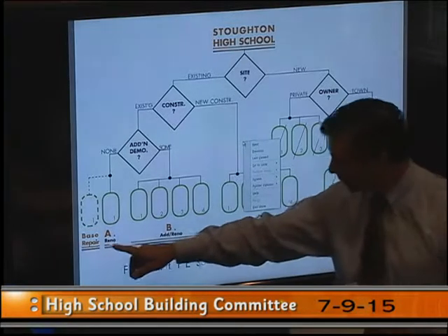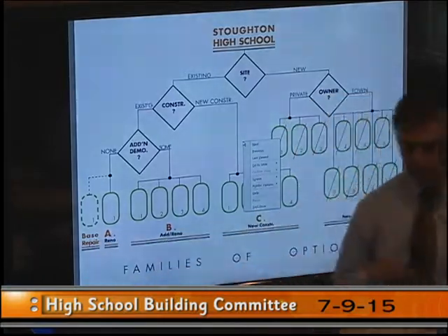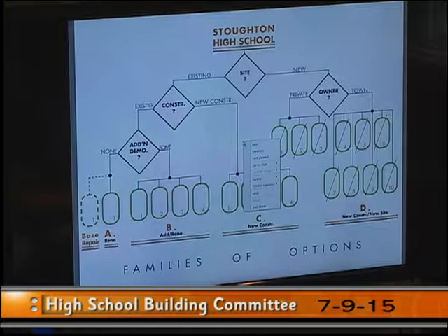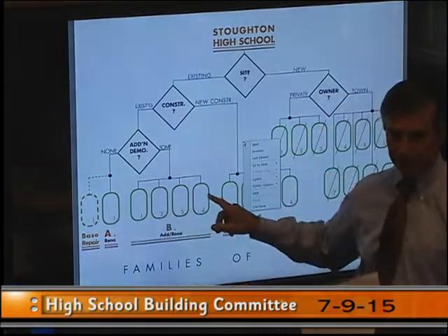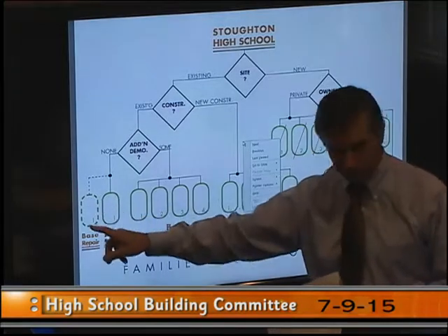And then further over, it doesn't even deserve a letter because it's just the base repair option. It's a requirement of MSBA, but it is useful in any of these considerations. We want to know what it would cost just to fix what's broken, is the simplest way to say it. Without changing any walls, without responding to the educational plan, but just bringing the roof, the windows, the enclosure, the heating system, the finishes, structure, all those systems up to code, up to current standards, how much would that cost? So we want that as a baseline. And whatever that is is inherently included in any of these, to a certain extent. If we're doing any renovation, we have to do all these things as part of it.